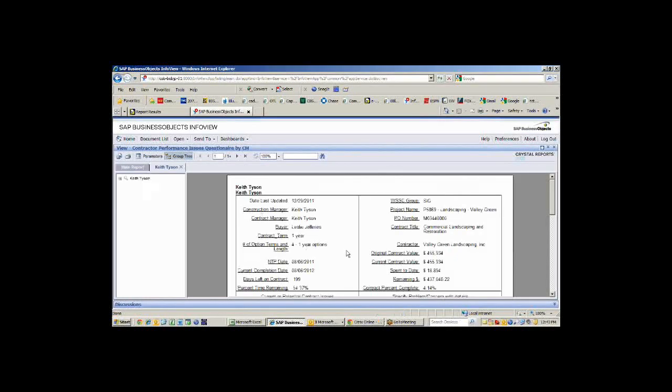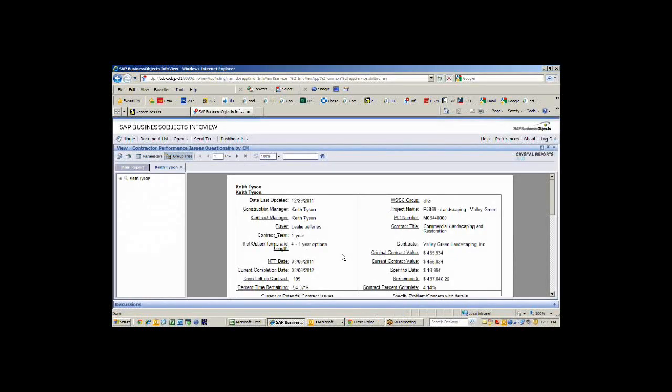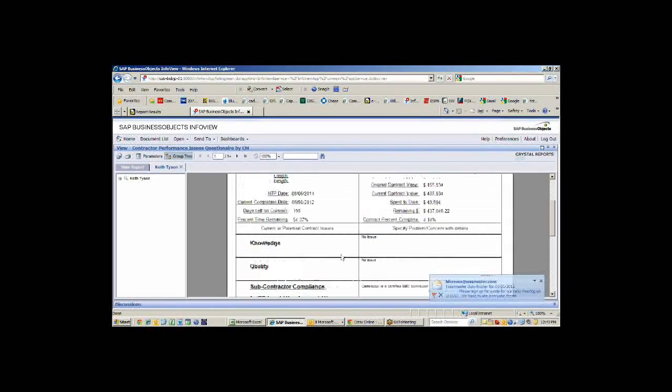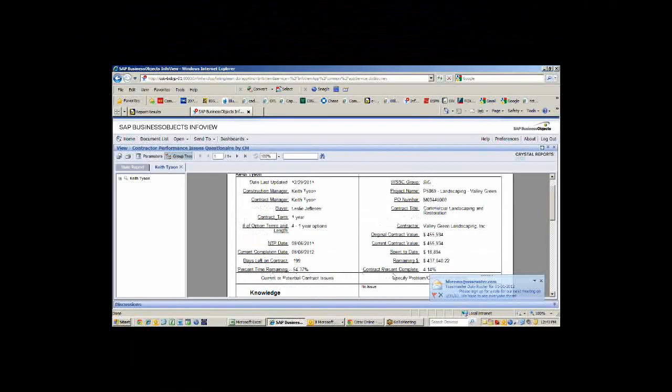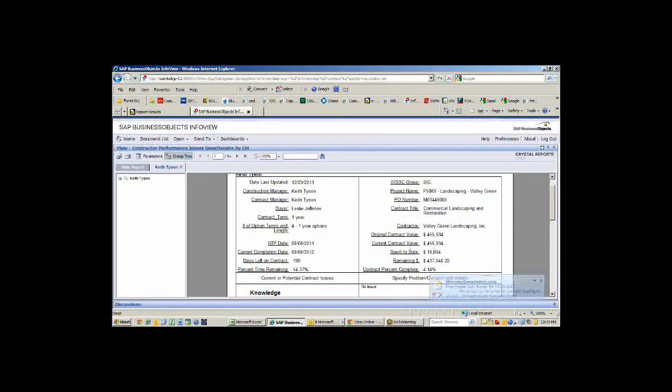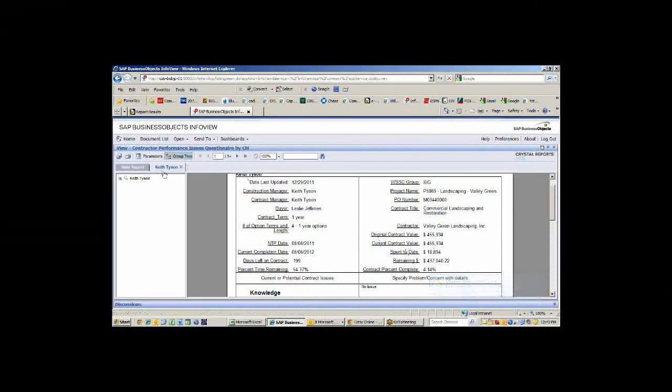Everybody's contracts are in here, so this is my landscaping contract. I can see how many days are left, how much I've spent, what percent of money I've spent, things like that.